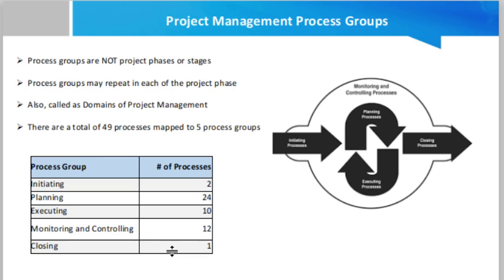First of all, notice that process groups are not project phases or stages. These process groups could be repeated in the project — they might be used in many places in the project lifecycle and are not sequential steps for completing a project. Despite not truly being project phases, they are often referred to as the five phases of project management. A project manager must understand how and when to apply these processes.